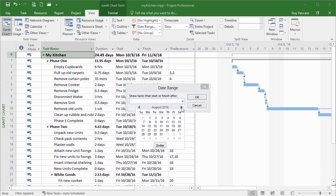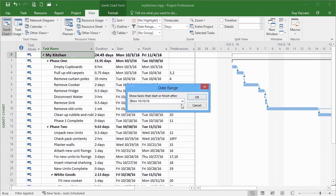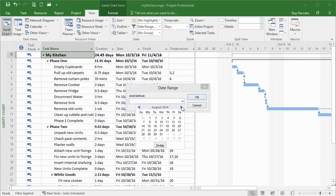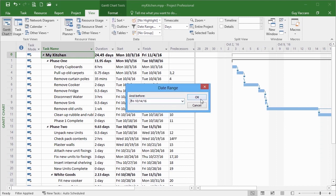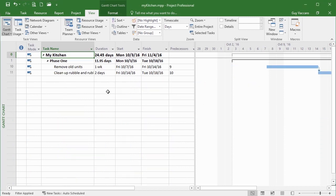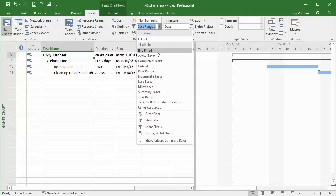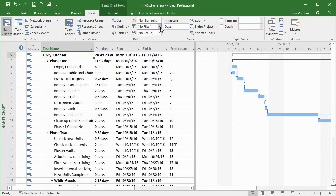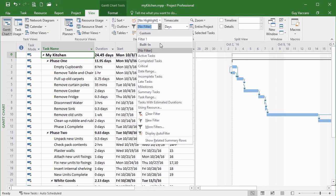Tasks in a particular date range — that is very useful when you've got a large project and want to see what's happening next week. In my project, it starts on the third, so let's say everything from the 10th to Friday the 14th. Then I get filtered and only see things happening in that week — in fact the only things we're doing are removing the old units and clearing up. Go back to the filter, choose No Filter, and all my tasks come back.